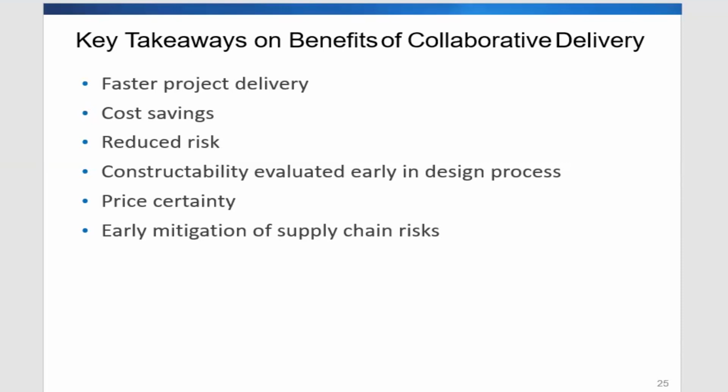And there's also reduced risk, because with a collaborative design approach, the contractor is involved right from the beginning, unlike the traditional approach where the contractor has no prior knowledge of the design intent. So they come in finally when the design is established and then bid. But with a collaborative approach, the contractor is involved right from the start. By doing that, they can identify any risk and decide to mitigate the risk earlier in the design, or even factor that risk as a cost into the final project, so that whatever would have resulted in a higher cost in a traditional approach can be mitigated with a collaborative approach.